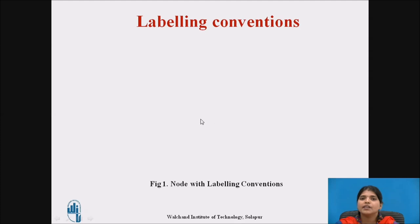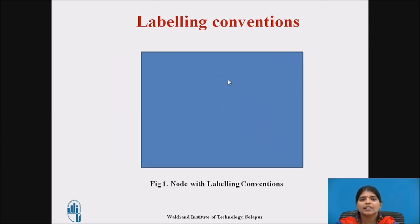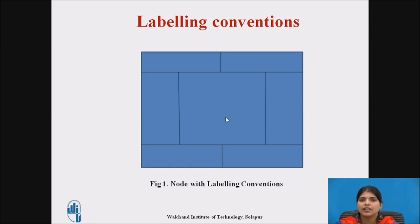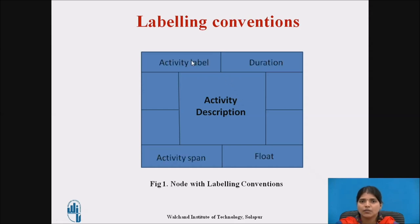First, take a rectangle. This rectangle is divided into two parts horizontally, and again these two parts are divided into two parts. The middle one is the activity description. The remaining parts are: activity label, duration, activity span, and float.